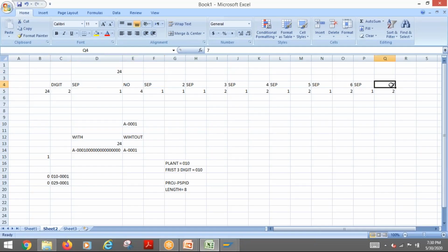Then you decide how many levels there are. You have to see based on their plan, because most projects will be using Primavera. So you refer to their Primavera plan or MS Project plan and consider that. If it is Primavera, it is easy, because they have WBS elements and networks. But in MS Project it is a bit difficult, because you have to identify which summary task they consider as a WBS element and which task as an activity.